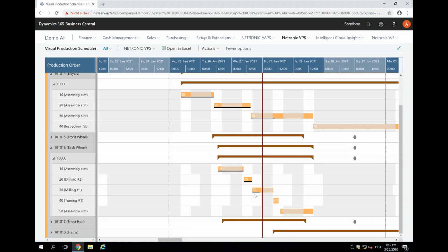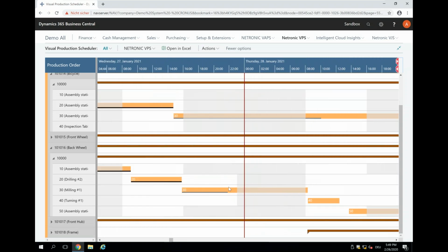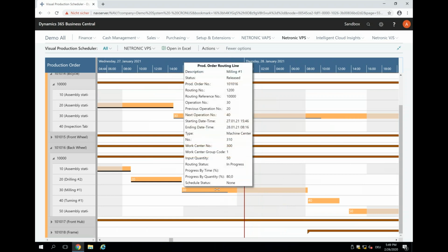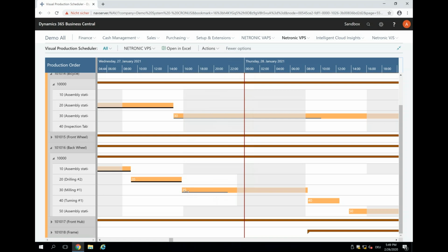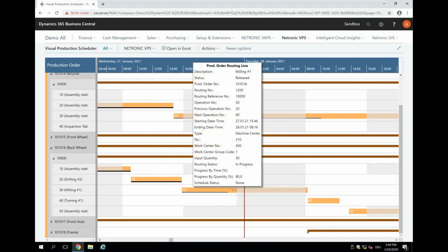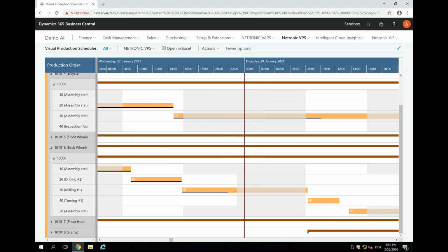And now if you look down here, there's the opposite case, right? So actually the percentage is 80%. But if this 80% is again net of the orange, then we are here. We posted output for this part of the production or this operation, but there has been no output posted for this. So actually we are a little bit behind the schedule. This is information we see from here.